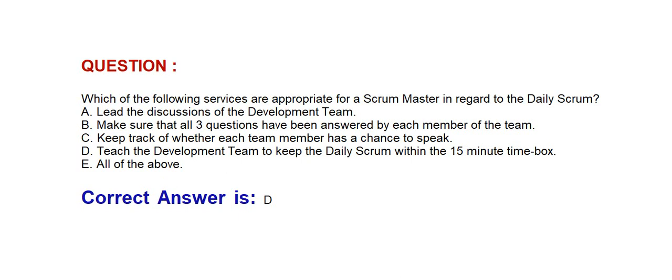Next question: Which of the following services are appropriate for a scrum master in regard to the daily scrum? Option A: Lead the discussions of the development team. Option B: Make sure that all three questions have been answered by each member of the team. Option C: Keep track of whether each team member has a chance to speak. Option D: Teach the development team to keep the daily scrum within the 15-minute time box. Option E: All of the above. Correct answer is Option D.